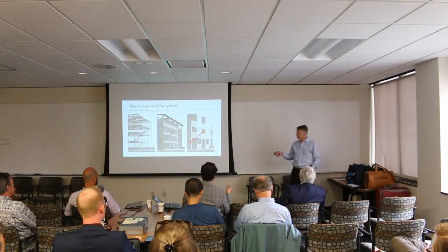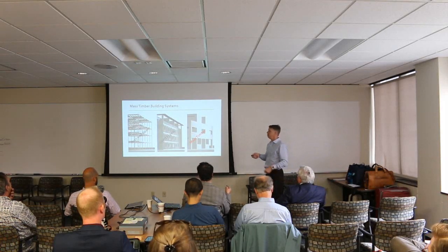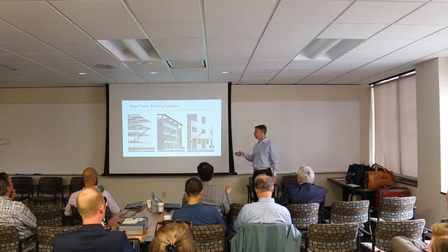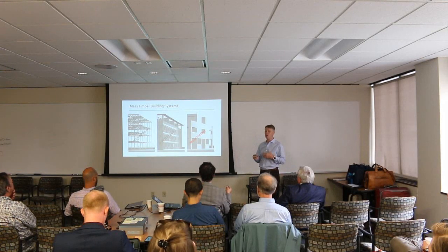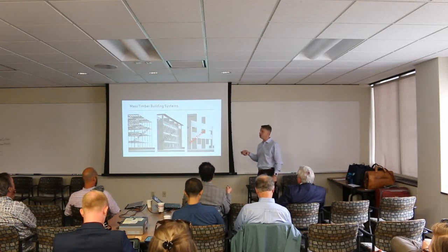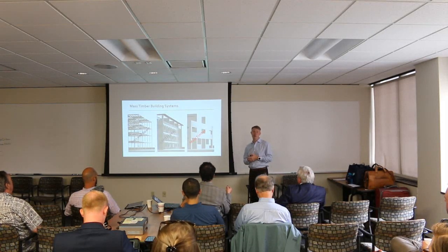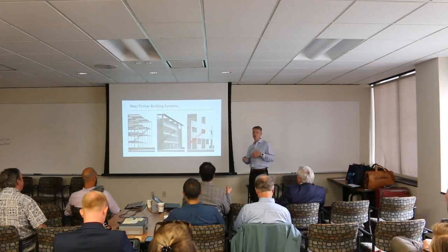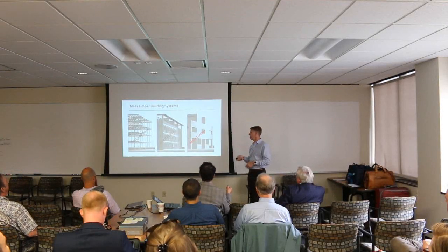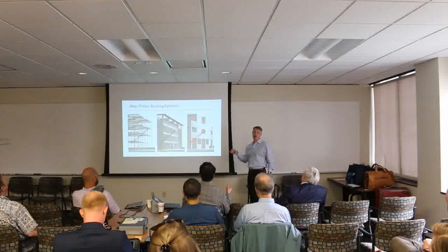So a lot of the projects I'm working on are post and beam. So glulam post and beam system, CLT floor plates. We're doing a lot of panelized projects. So stick framed walls with CLT floor plates. Again, Logan mentioned, these panels are typically about 15 minutes per panel. So we're doing about a story per week pretty easily on projects, and that's why we're stick frame panelizing the